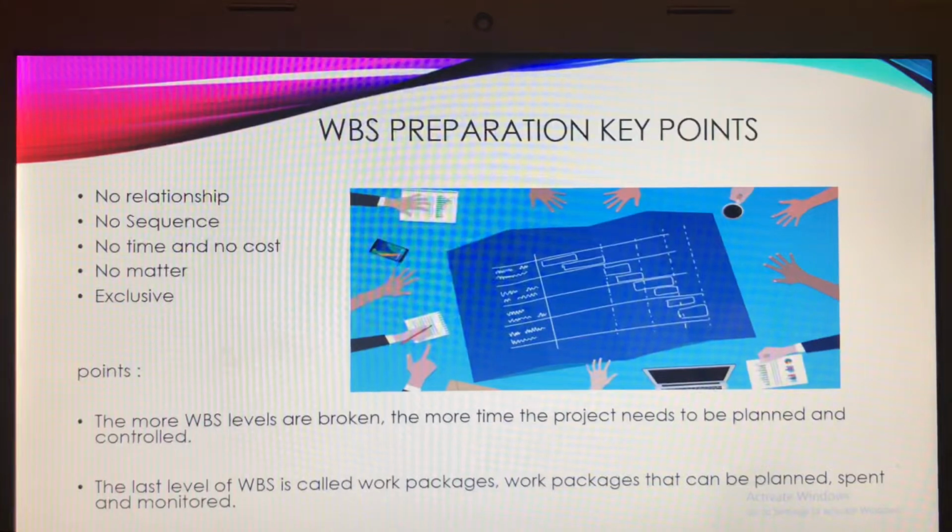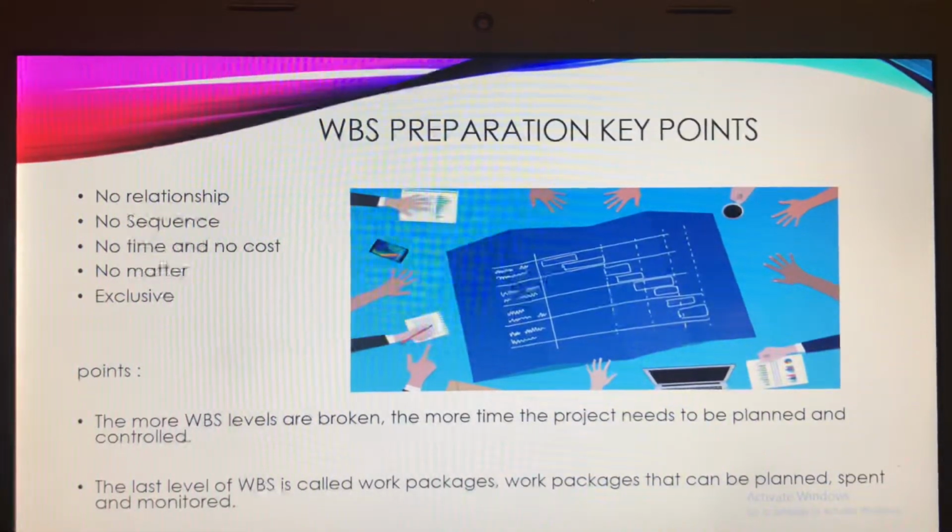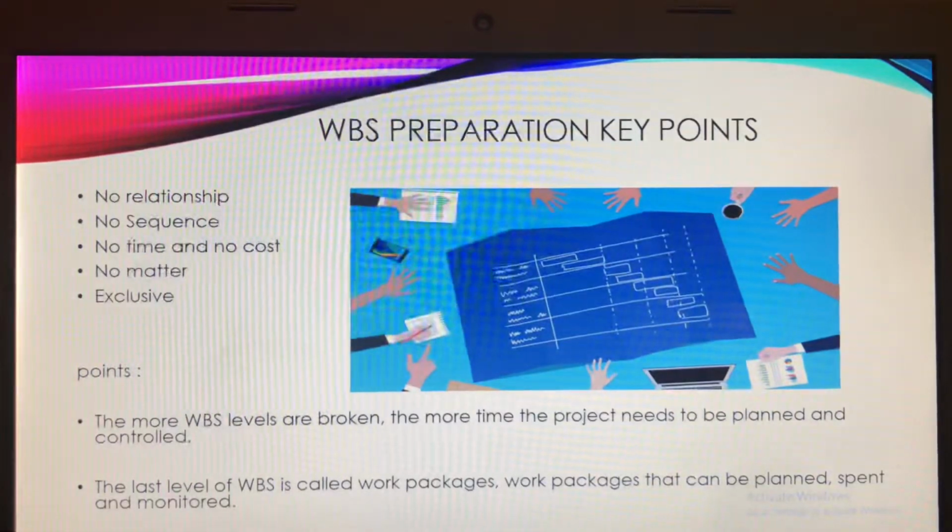WBS preparation key points. We have some points, and the important ones are no relationships. There are no relationships between WBS levels. No sequence. WBS elements do not take precedence over each other. No time and no cost.